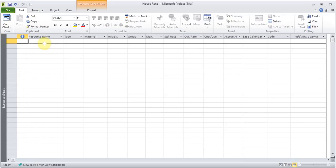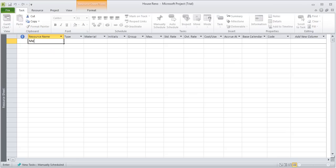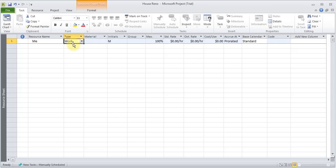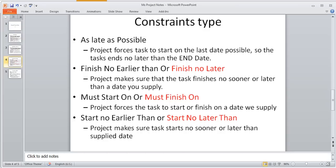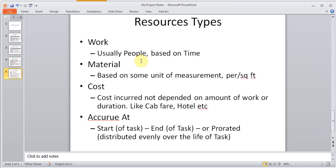Now, here is where we start typing our resources, which is the painter, the laborer. Now you can actually type the person's name, or you can just keep it generic. So if you were working in an office assistant or something like that, so I can start adding things. So say I wanted to add a... First, let me add me, because I'm going to do some of the jobs. And I'm going to do a work. So there are a couple of different types here. Types, which are work, material, and cost.